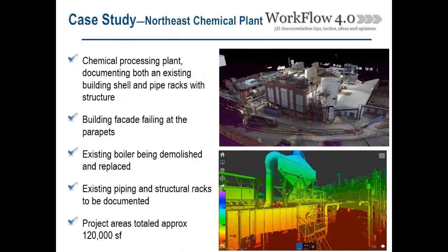With that building facade, they particularly wanted to focus on the parapets — what spots are failing, what spots are out of plumb, what spots need repointing, and where to focus the work. All these things are hard to field measure, so laser scanning was a perfect tool for that. The existing boiler was being replaced along with the structural racks. Overall, between the building, structure, and pipe racks, the total square footage was about 120,000 square feet, fairly spread out across a couple of parts of the site.